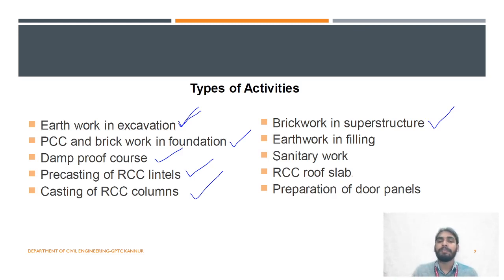While constructing the walls, parallelly we can prepare the door panels. After constructing the walls we can just fix them. If we have constructed the wall today, the day after tomorrow you can fix the door panels, so that the speed of the construction may be increased. So the planning engineer has to know what activities can be done parallelly.